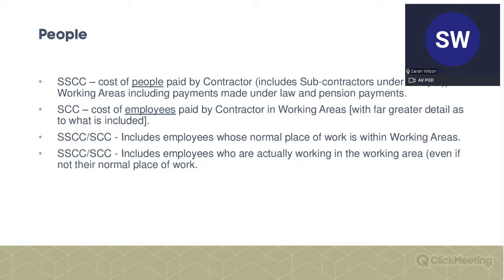So it includes an individual who might be working as a people cost. So they might be working back in your head office, but for this project, their normal place of work must be within the working area. It also includes someone who is specifically not engaged usually within the working area, but for a particular piece of work, which is being charged, they are working within that.